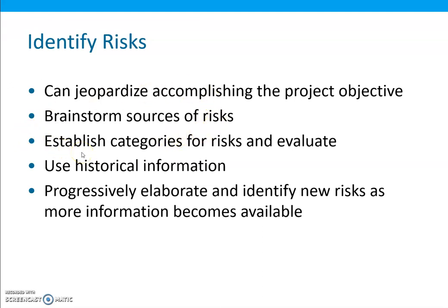external risks. For example, inclement weather is an external risk. Changes in government regulations is an external risk. Change in consumer preferences is an external risk. Local protesters filing legal action to delay the project is an external risk.